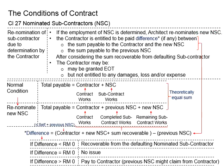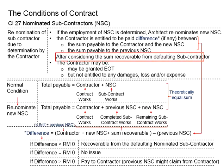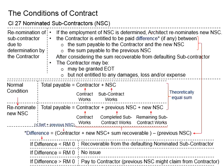Under these circumstances, in terms of payment, the contractor is entitled to be paid the differences between the sum payable to the contractor and the new nominated subcontractor, and the sum payable to the previous nominated subcontractor. This will be after consideration of the sum recoverable from the defaulting subcontractor. If there are no differences, no payment should be entitled to the contractor.